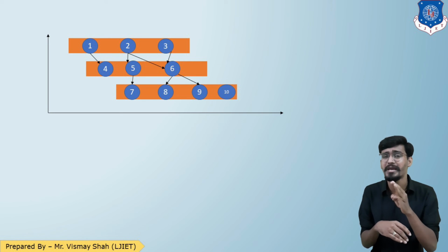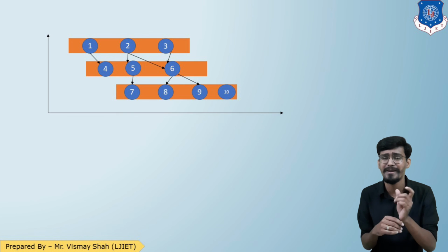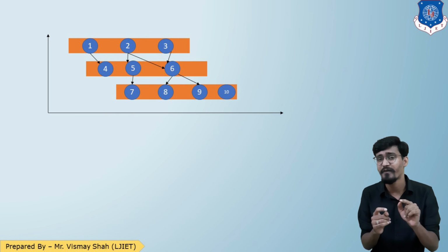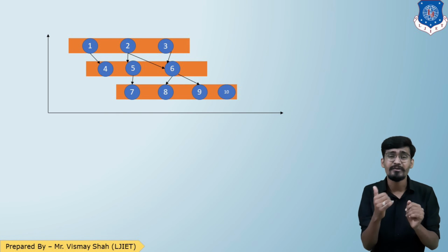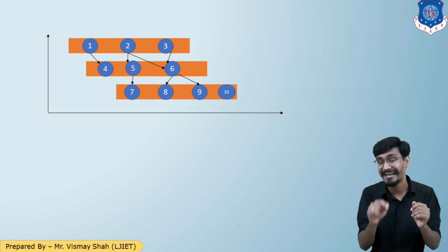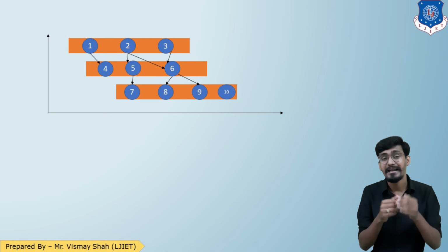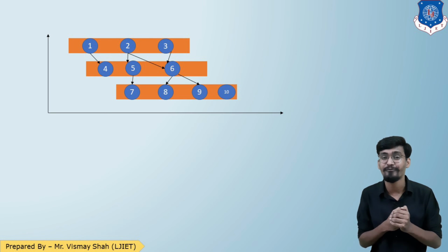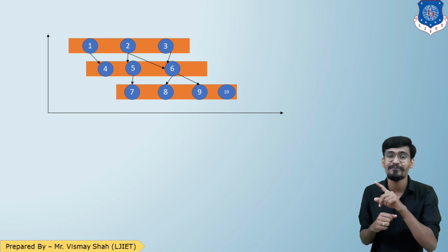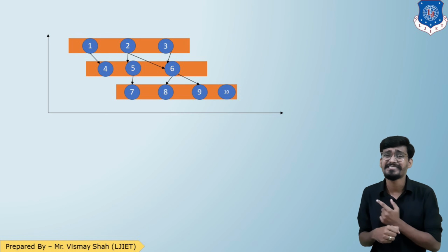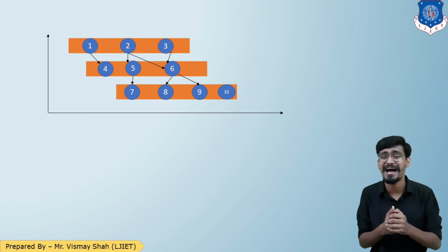activity 1 has three sub activities or sub milestones, that is 1, 2 and 3. Now 1 will be the site clearance, the second will be the preparation of base, and the third will be reinforcement, that is for the preparation of the base of the foundation. Now the next is concreting of the foundation. The third milestone, reinforcement, is directly interrelated with the concrete, which can happen only after it. So we can have the relation between 3 and 4, where 3 is a milestone of activity A and 4 is the first milestone of activity B. So this is how the milestone chart works.